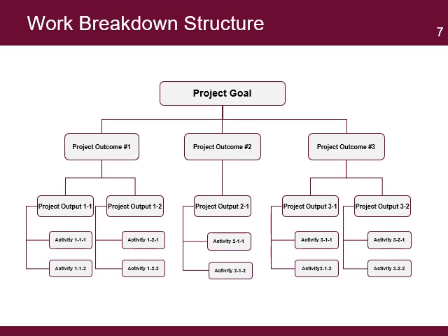The example shows a diagram of a WBS. The top level is the project goal. On the second level are the project outcomes. The third level groups the project outputs and contains all the project activities at the fourth level. The WBS builds the relationship among all elements of the project. The structure is built following a direct relationship between the expected final goals down to all the planned activities of the project. The information should include detailed descriptions of each level and the indicators of achievement selected by the project to measure progress. Most information used to create the WBS comes from the logical framework matrix.